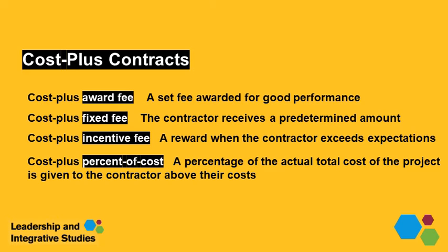For all these contract types, the purchaser carries more of the risk. Additionally, there is more flexibility for the supplier rather than for the purchaser. But these types of contracts are helpful when engaging in new areas for both the purchaser and the supplier.